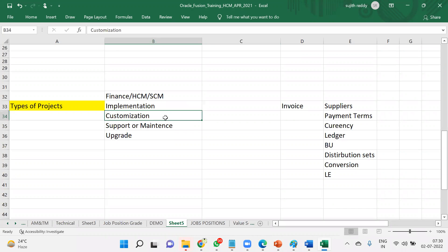Next, customization projects. Customization means the product is already implemented, but the client would like to make some changes. For example, if the product was already implemented in 2021 and now the client wants some more customizations, those changes fall under a customization project.